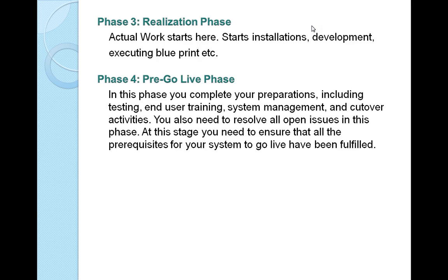In this phase, you complete your preparation, including the testing, end user training, system management, and cutover activities. Once you finish your development, everything is developed, configured as per your requirements. So here finally you need to test whether it matches your business requirement, whether it fulfilled your business requirement or not, whether it reaches your target or not. Everything you can test here. Is there any errors, whether it is throwing any bugs, or is there any problem in reports, what you expected, otherwise whether it is causing any problem in your business, like that, everything you can test here.